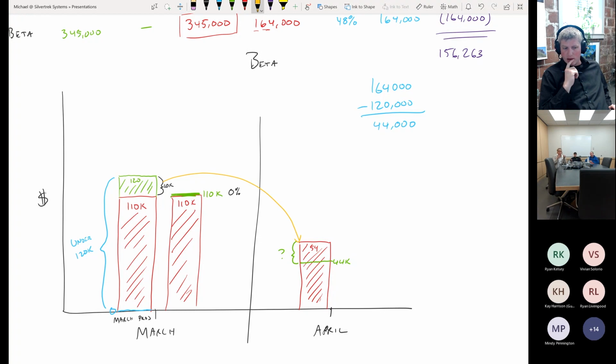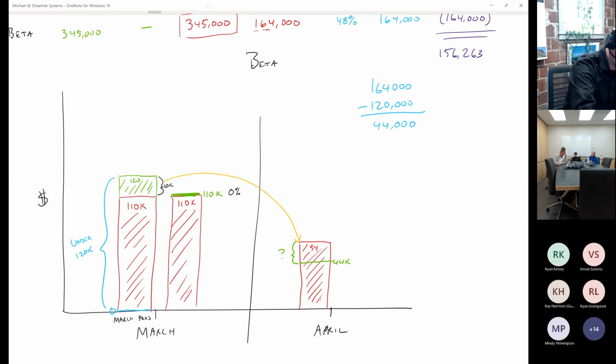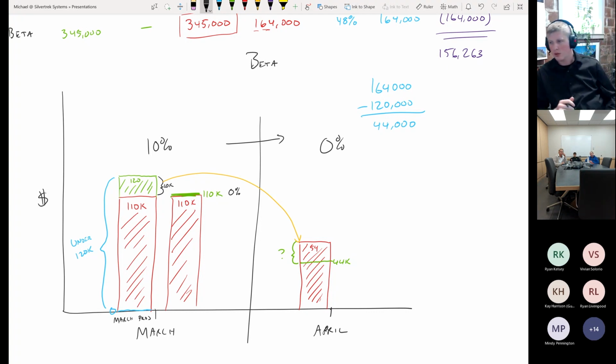So in the second month here in April, only because of a projection change from a margin going from 10% in March to 0% in April, we lost $10,000 in April. This can have serious and very confusing effects on your profit and loss, especially when you're nearly complete with a very large job and the margin drops. Single-digit percentage drops on a single project can dramatically affect your P&L if that project is almost done, if you've over-earned your revenue in previous months.